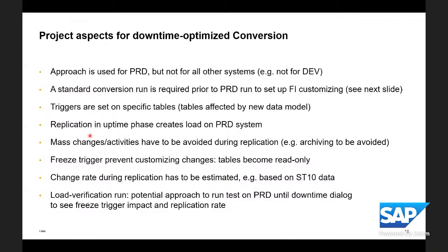We have this replication of end user changes. During this replication phase, where the tool will anyhow create load on the system, you have to avoid mass changes or mass activities on the system. Because any mass activities, changing database entries, will result in additional replication activities. So you should avoid archiving.